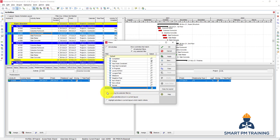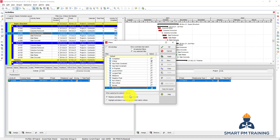At the bottom, when applying the selected filters, you choose what you want Primavera to do: Replace activities shown in the current layout — meaning Primavera will hide any activities not part of the filter — or Primavera will show all activities but only highlight the filtered ones.